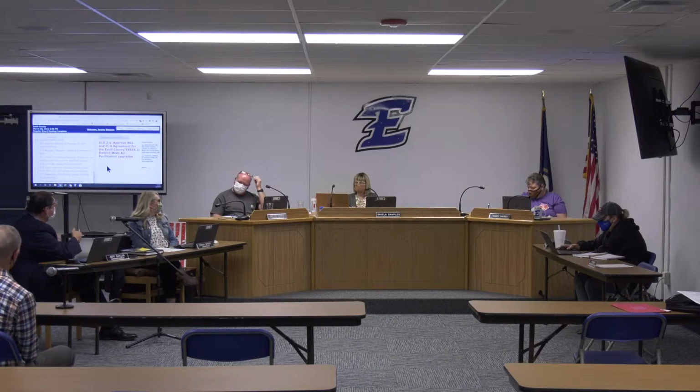It's going to be in 3 phases. Phase 1 is the baseball, softball complex. It will start in June, and it will run all the way through November. The high school project itself, there will be some of that. I believe we said it was phase 3? It's phase 3. High school is actually phase 3. A majority of that work will take place next summer, but a lot of that work will take place during the school year. The work in the gym will take place.